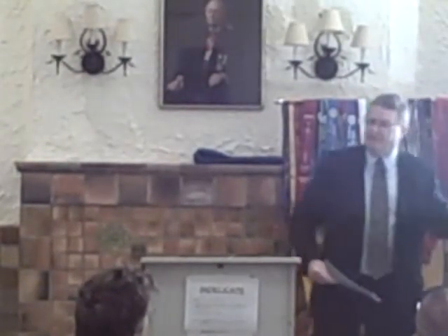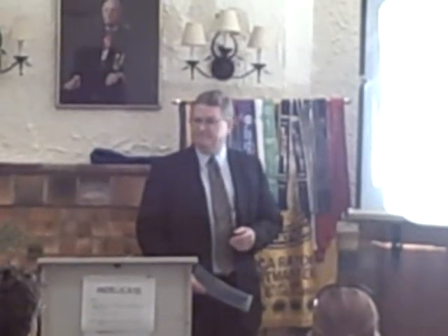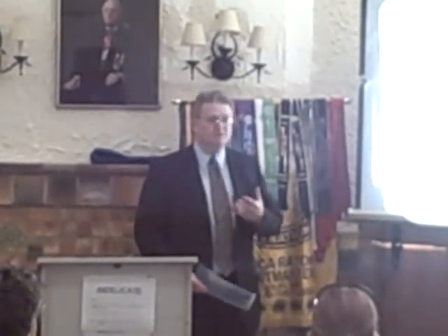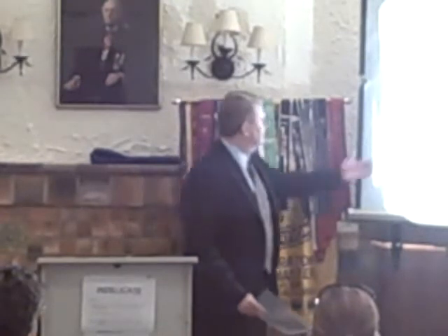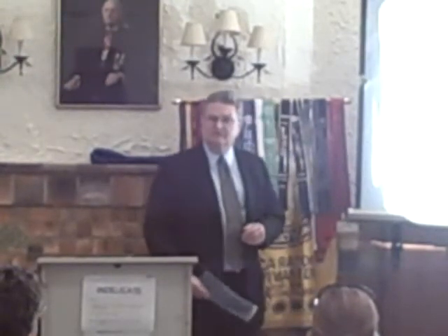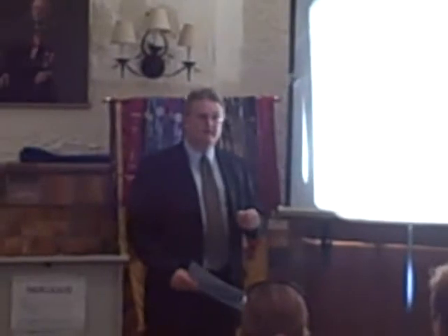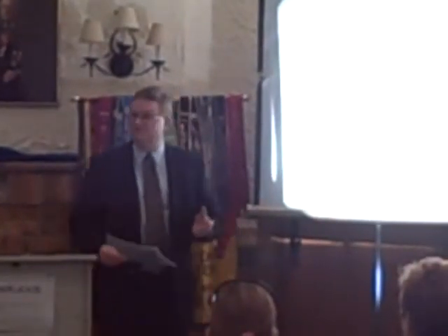Potential problems have likely causes. When they occur, they also have effects. We can choose to take actions against the likely causes. Those actions are called preventive actions. We can also choose to take actions against the effects. Those actions are known as contingent actions.